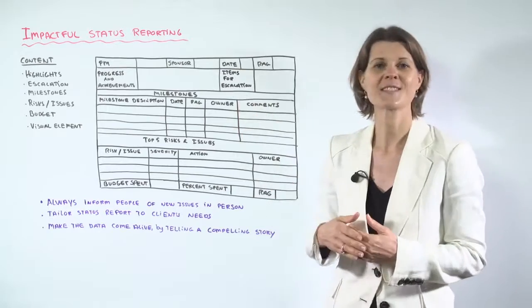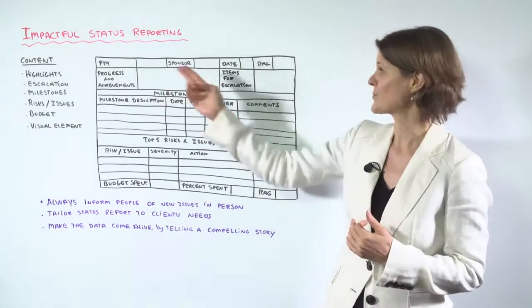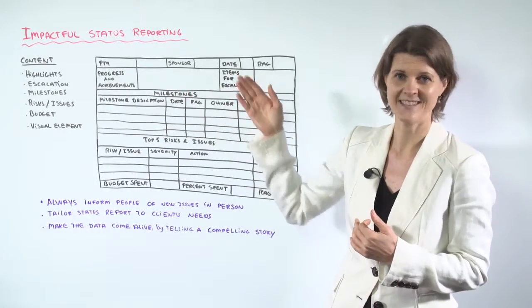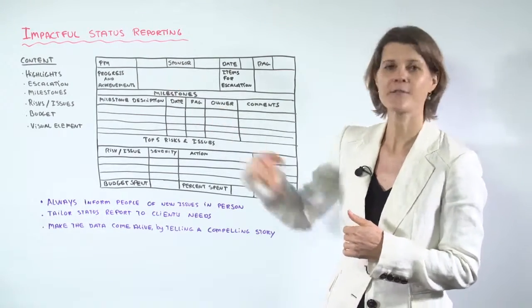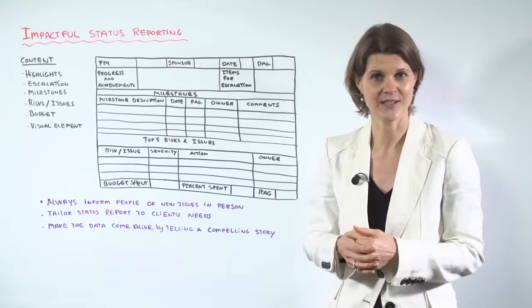At the top we've got some standard fields such as who is the project manager, the date, and the RAG red amber green status. And then I've got some space here for progress and achievements. It's a bit of an executive summary.